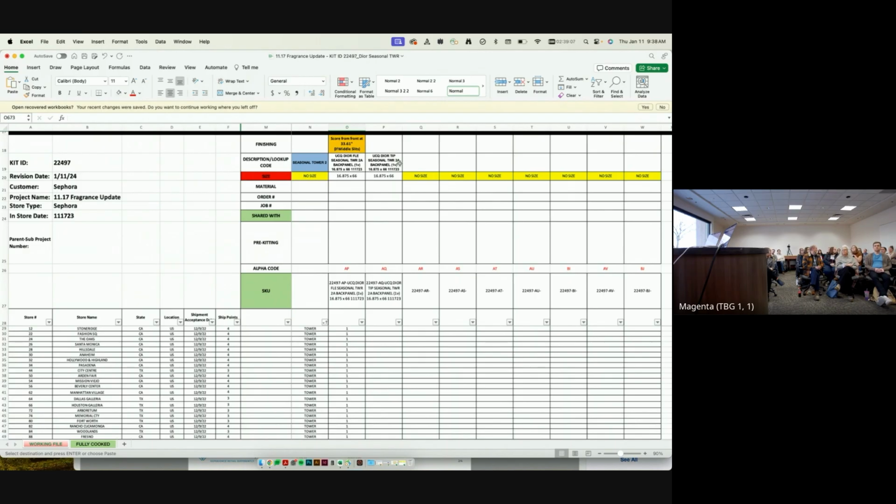What does it do to them? Oh, when? What's the lead time you guys are prior to shipping? I think we have to have it to planning 2 weeks prior to shipping, but we have to have it done well before that. For ordering, 6 weeks in advance, because we need to know the quantities for ordering our parts 10 weeks in advance. This is what we use to enter our hub orders.